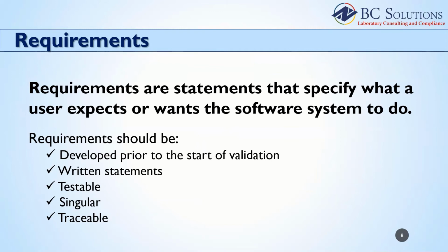They should be written statements documented in a language that is understandable and clear. Each requirement should be testable and measurable so that they can be verified by objective evidence of how the system responded. The requirements should be singular, in which they address one need, function, or expectation. And they should be traceable.